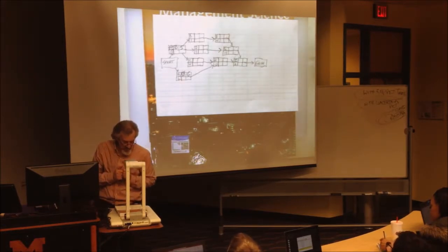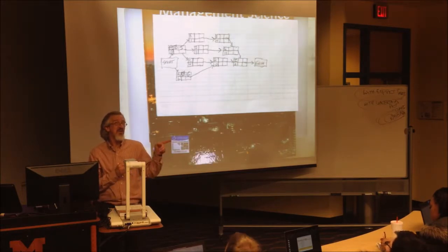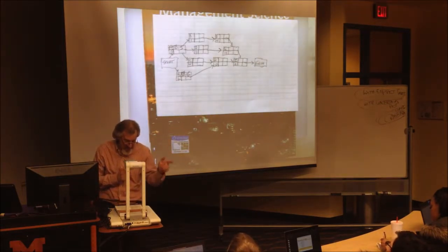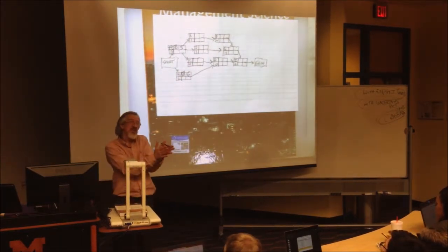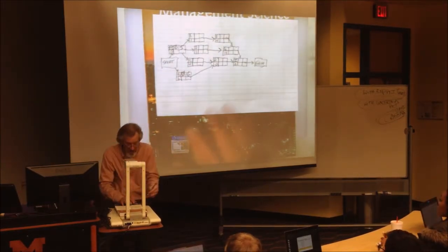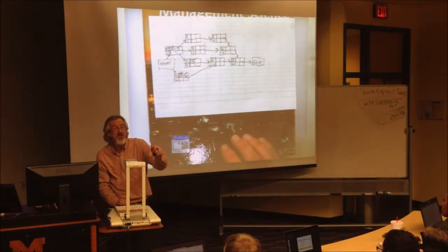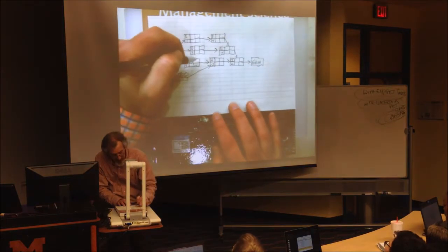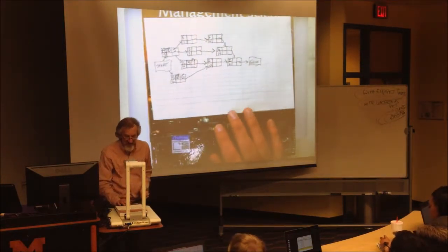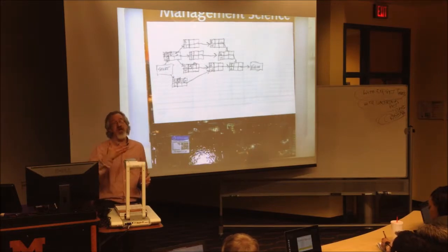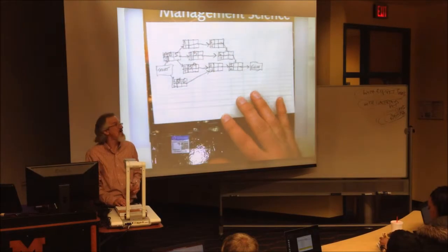Let's go to C. C is immediately preceded by A. A is done on day 5. There's nothing else that precedes C, so on day 5, when that gets done, C can start on day 5. C takes 4 days. It needs to be finished on day 9. You got it. Let's go to D. Only preceded by A. A finishes on day 5, so it can start on day 5.